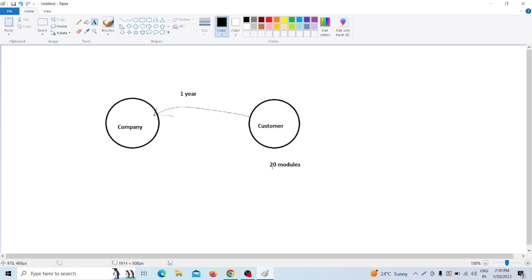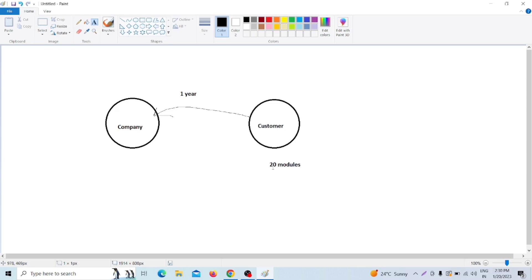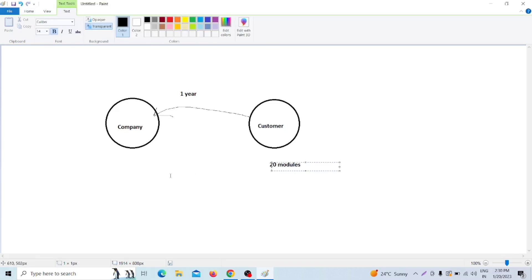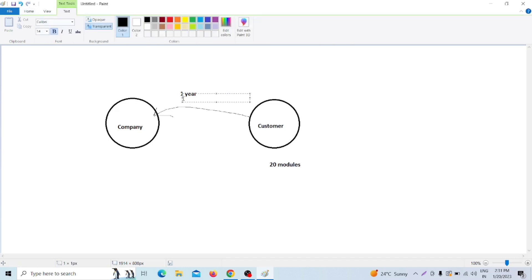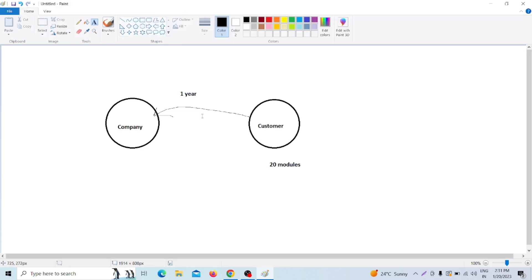Suppose the company says that after two weeks we will complete the module and release it. That means each module takes 14 days. In 14 days, each module is complete and released to the customer. The customer will wait every 14 days, or every two weeks. The customer can also provide requirement changes at any point.